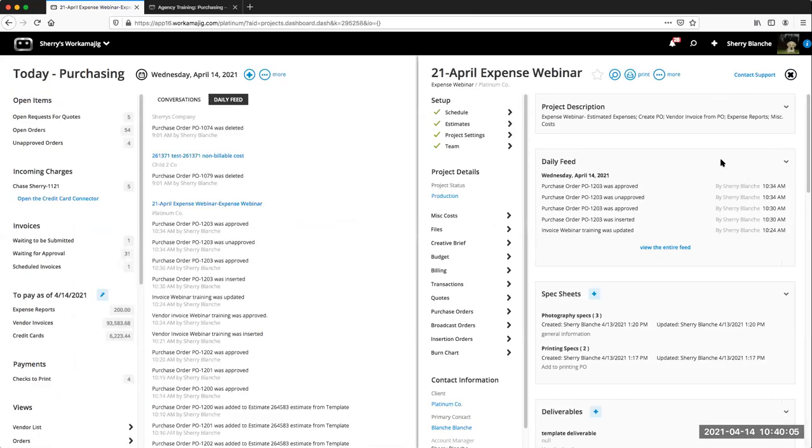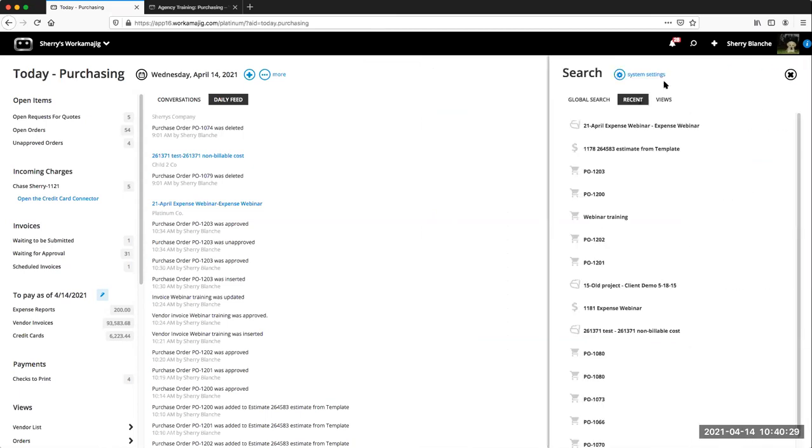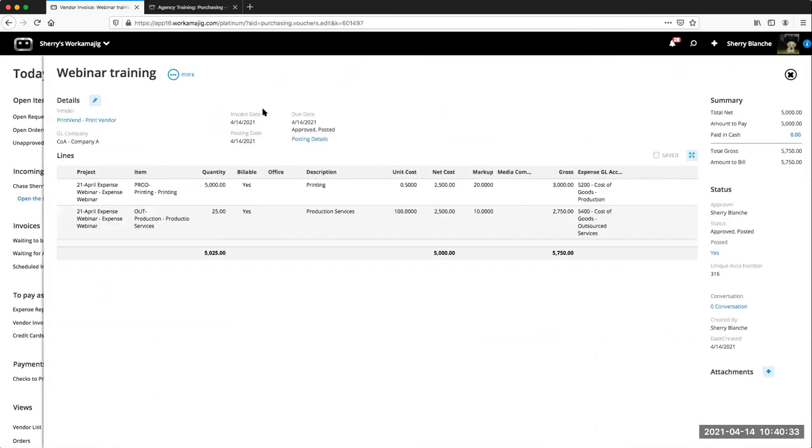I have a question about calling out the multiple projects and clients when entering the vendor invoice. Yes, your vendor invoice, when you create those, you can have multiple lines to different projects. You might be buying from one vendor. It's the line detail that connects the expense to the project. So if you do enter a vendor invoice that relates to multiple projects, let me just unapprove this one so we can see that.